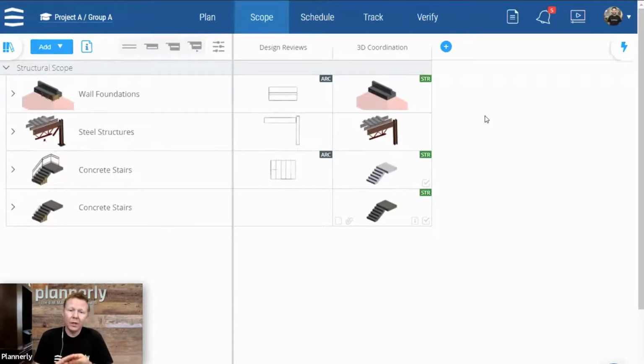And then for each milestone, how much geometry do they need it in 2D, in 3D? Do we need it in fabrication level geometry? Do we need to have additional information requirements from other people? Maybe if it was a handover milestone, you would need more information and less geometry. So it's very, very dependent on what you would like to provide and what that requirement looks like for your course. We certainly will provide some advice on the setup meeting as well.